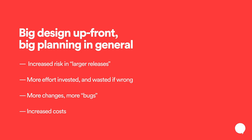So you can imagine this is what leads to those very large QA phases, very tense, like, we're going to launch this rocket to the moon, so we need to plan everything out, kind of environments around launching a website. And this typically comes into play when everybody's just ready for it all to be over, right? You hit this QA phase, and that's when you find out about all the bugs, and the bug list just grows and grows. And this is basically when everybody wanted the project to be over, but now they're getting piled on with these surprise problems. Okay.